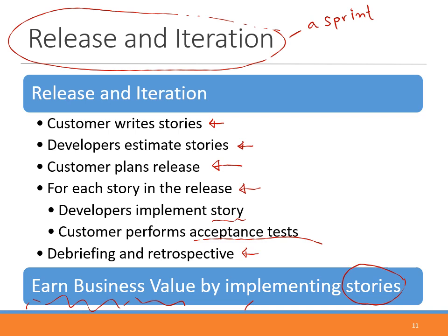But you can earn only when your product is finished and you satisfy the customer, there's a customer buying it, right? The same here. We earn the business value, the point that you estimate in terms of the importance. You can earn those points only when you fully complete the story and your customers are happy with the story you implement. This is important, right?